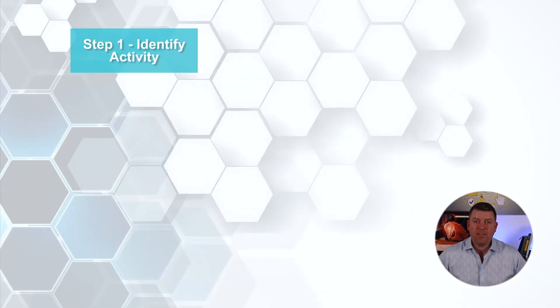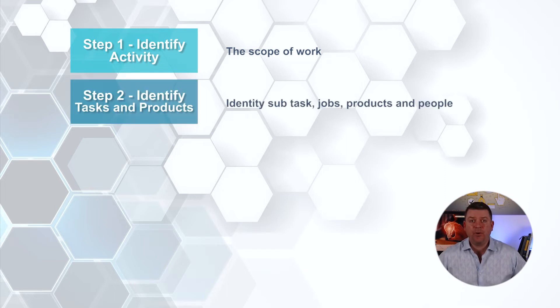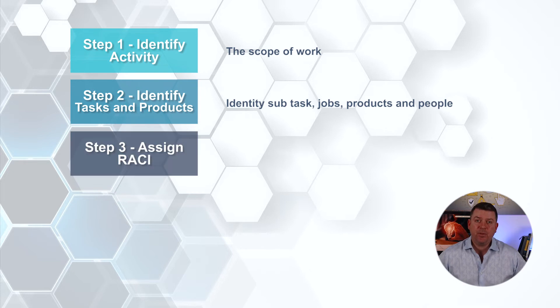The process for creating a RACI is relatively simple. The first step is to identify all the activities that you're seeking to include within the scope of the RACI itself. This scope can be as narrow or as broad as you need it to be — it could be at the highest commercial level, like a RACI for EMAI, sales and revenue, or really detailed, like subsections of the business case. Next, identify all the people, products and sub-tasks related to that activity. After this, assign the RACI elements to each task.